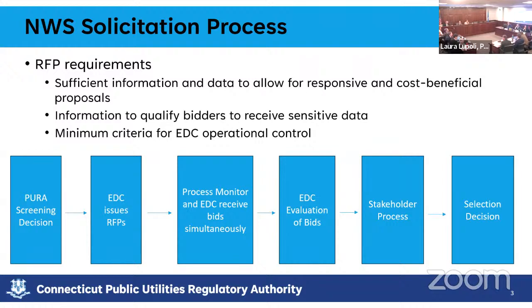So if those were approved, how would the company interconnect those projects? I'm sorry, yeah, so those projects would go through the interconnection process, just like any other project owned by a third party. And so they would essentially wait in the interconnection queue until a lot of other third-party developers interconnect their projects, and then eventually Eversource would arrive at its place in the queue. That is correct. And if I may, it was an example that just happened with UI, with the Pleasure Beach project. It needed to go through the interconnection queue to be able to start rolling. So we passed the project through the queue.